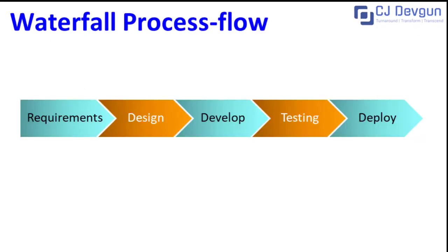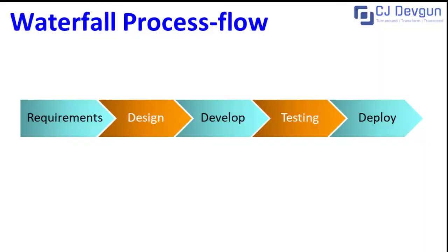We learned that waterfall is a linear methodology, meaning the next phase starts only after the current phase ends. The significance of this is that you must define all the requirements before you start design activities, which often results in wasted effort. Why? Because, my friend, you make no distinction between a high priority item versus a low priority item. The demand of waterfall means that you must complete all the activities in that phase.